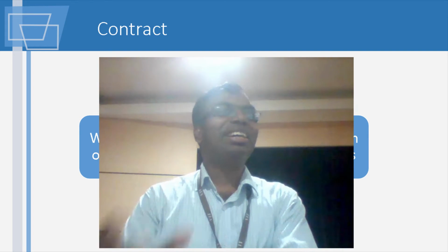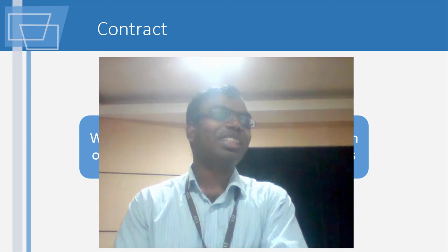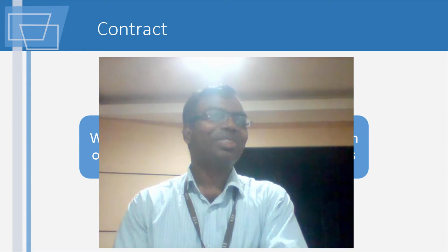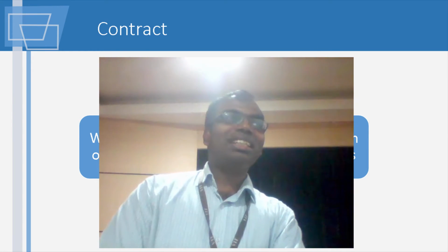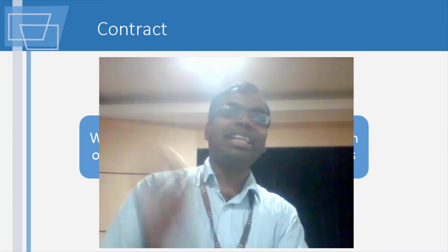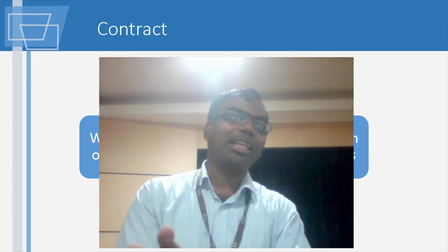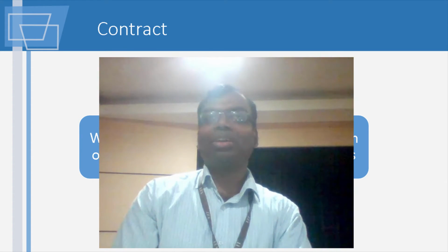Okay, so in Mumbai, the monsoon is also as good as the local trains. No, they stick to time, right? Both the local train and the monsoons, they are very punctual. So that is the thing, where a contractor knows it's likely to flood. In spite of that, if he's not taking precautions, it's not going to be considered as an act of God.